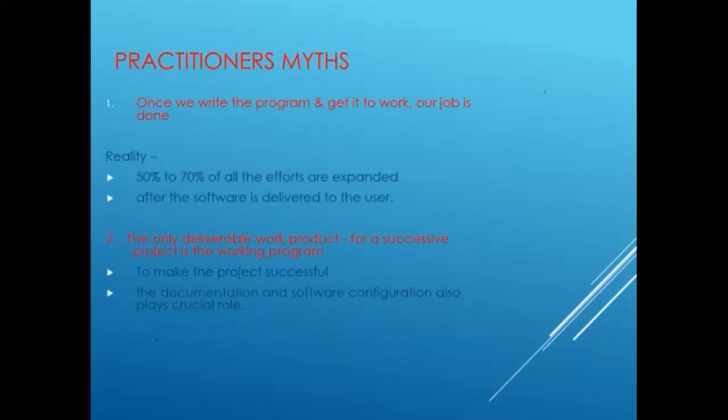Practitioner myths. Myth: once we write the program and get it to work, our job is done. But the reality is that 50% to 70% of all the effort is expended after the software is delivered to the user.